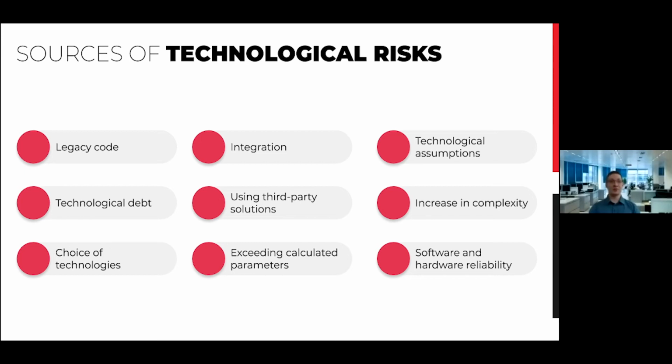It may be legacy code, when we got the unfinished project from a previous developer, we don't know about the problems that may already exist in the code base. And when we face them, we will need to spend additional time and additional effort to handle them.